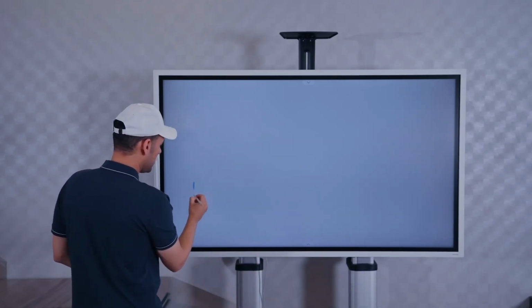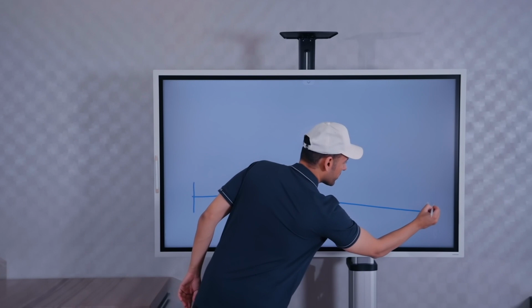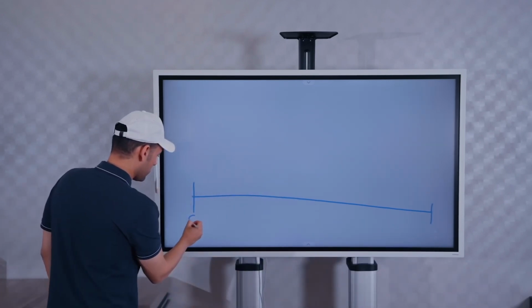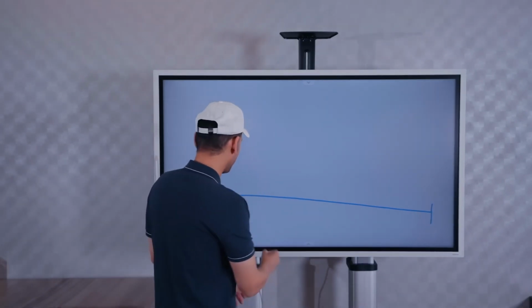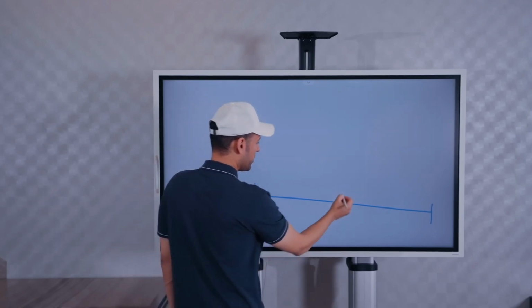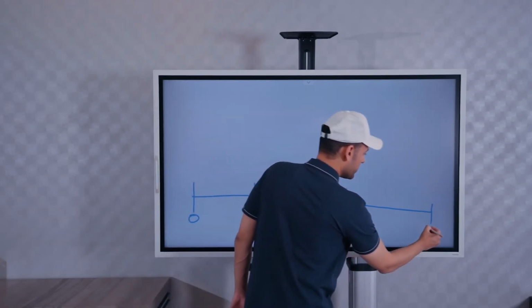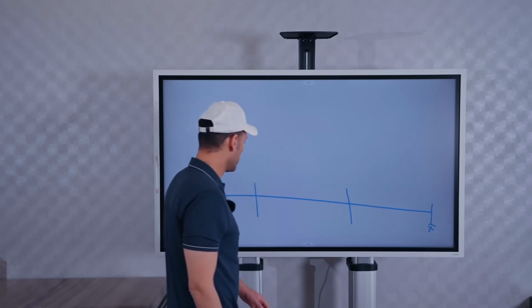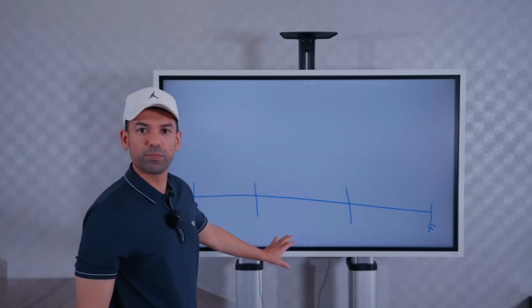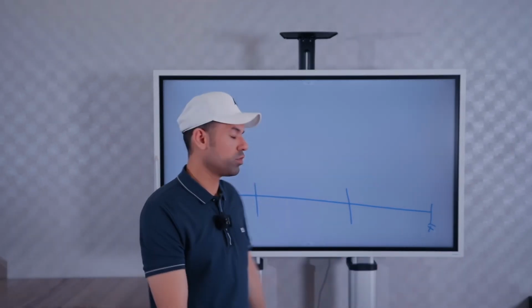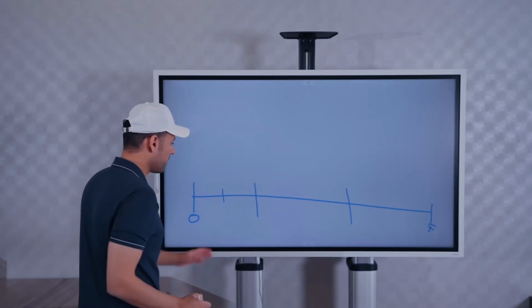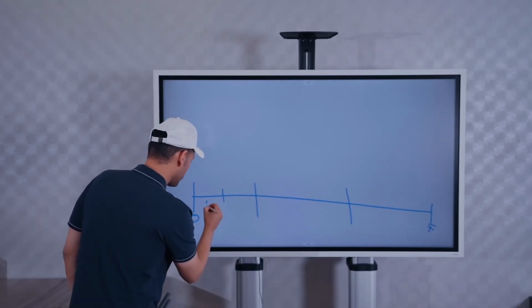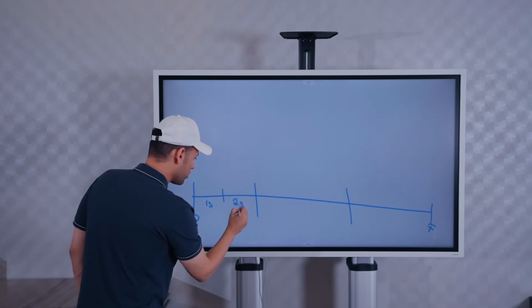So let's just put a timeline in here, right? 3 months. The 0th day, 1 month has passed, 2 months has passed, and this is the final day. Obviously, we have sprints running. Sprint is roughly about 2 weeks. So within the first month, we've got about 1 sprint here, 1 sprint, 2 sprints here.